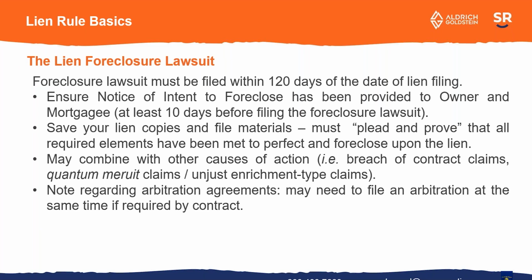The lien foreclosure lawsuit itself needs to be filed within 120 days of the date of lien filing. So if you remember anything from this, just 75 days from the last date of work on the project or substantial completion, and then the foreclosure lawsuit 120 days after that. So that's when you actually file in state court.